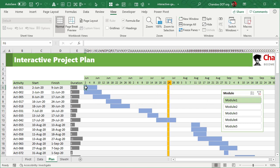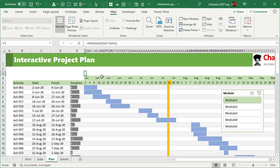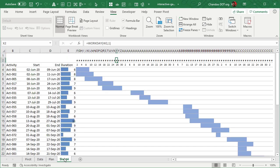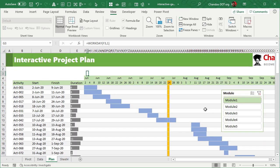So this is actually working at a daily level. If you want to kind of take it up to weekly level or monthly level, you can again apply conditional formatting to check on that. All you have to do is change your calculation. So instead of workday or anything, you would add plus seven to go to the next week and always do plus seven and then apply your between conditions in a different way to check if a given activity is happening on any given week or not. So those are some of the techniques.